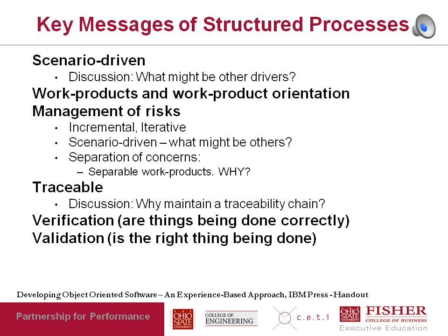The third key message is one of management of risks. So a lot of things will be done in these processes simply in order to manage risk. One of the reasons why a waterfall process, where all the requirements are collected in the beginning, all the analysis is done, the entire system is designed and then implemented and then tested, is not a recommended process, is really due to the fact that that top-down waterfall approach is very risky and because it does not handle change well. So there are many techniques used to manage risks.